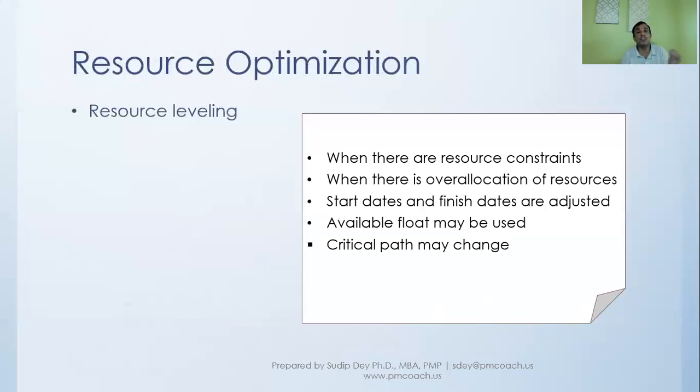And we found, because of the sequence, because of the way we have structured it and so on, because of different constraints, some of the resource might have been allocated 16 hours of work, or some might have been allocated 8 hours of work, but then this resource for that particular day is available only for 4 hours. So when that happens, you have to level it to meet the constraints. So this is what we talk about. We have to adhere to that resource constraint, and we have to see there is no over allocation.